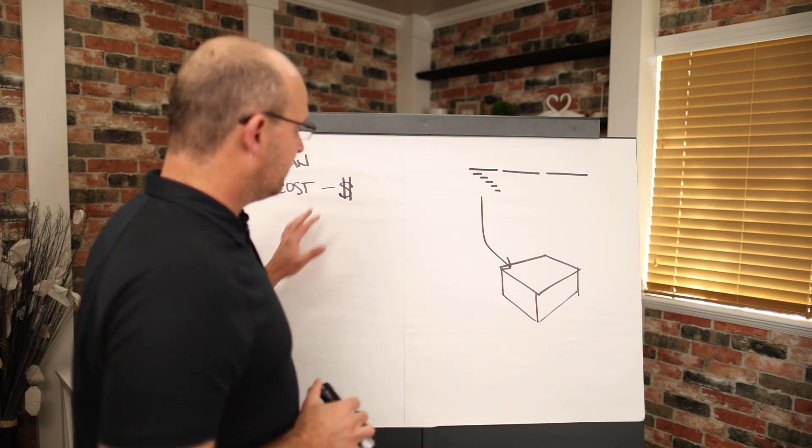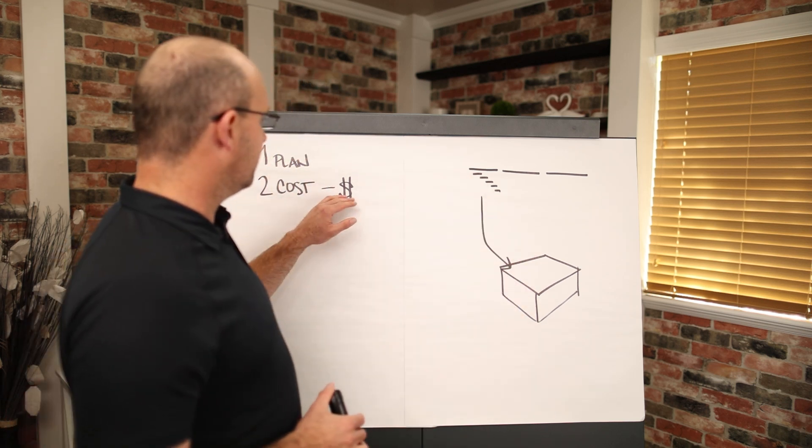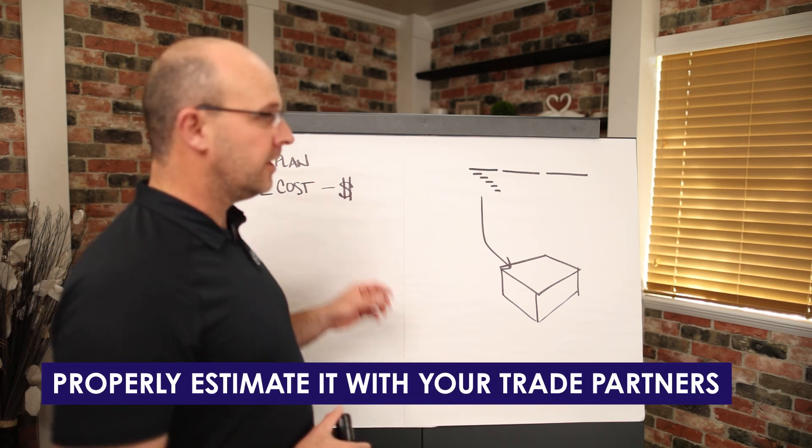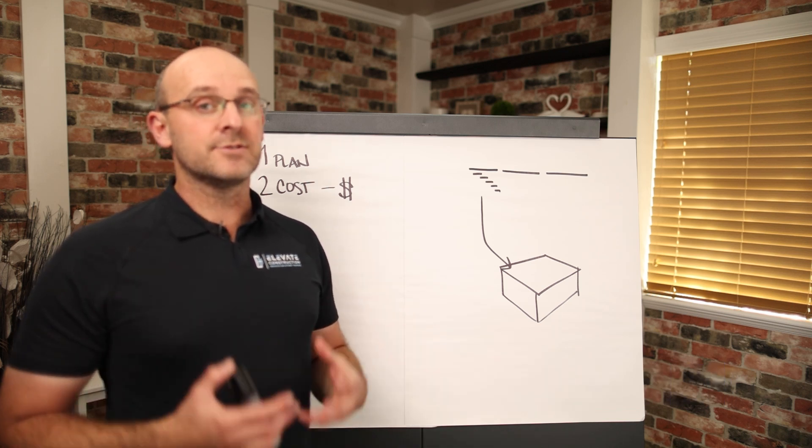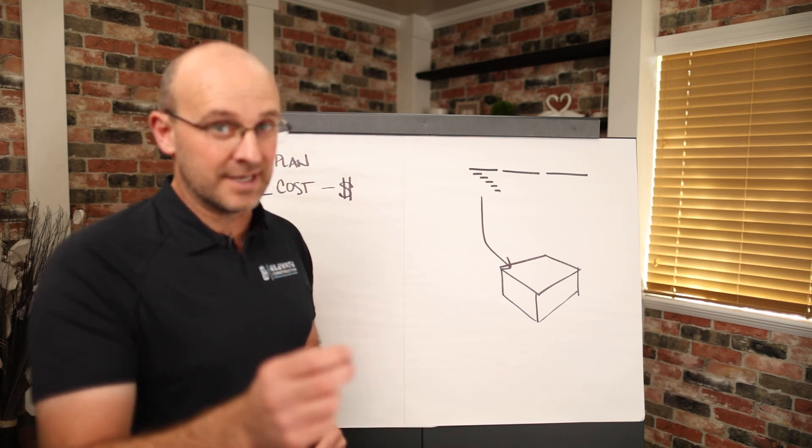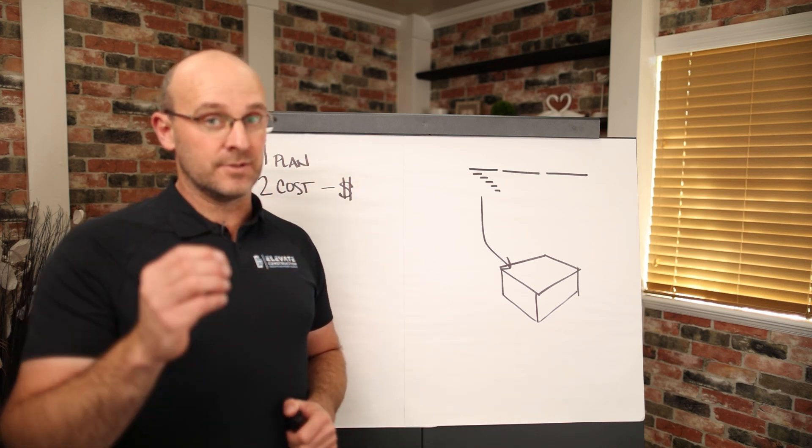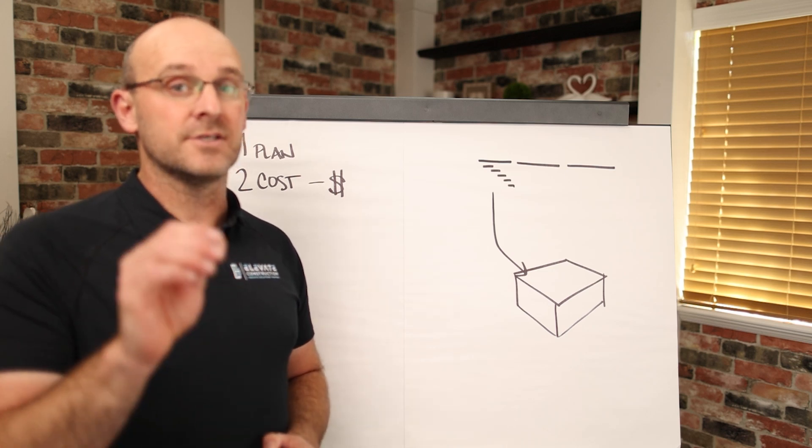So once you have your plan and you know exactly how you're going to approach it, the proper method, step number two in construction management is to be able to properly estimate it with your trade partners, also compare to control estimates, and be able to build a proper overall budget for directs and indirects, right? For the cost of work and what it takes to manage the project with your general conditions and general requirements so that the owner has some cost certainty.